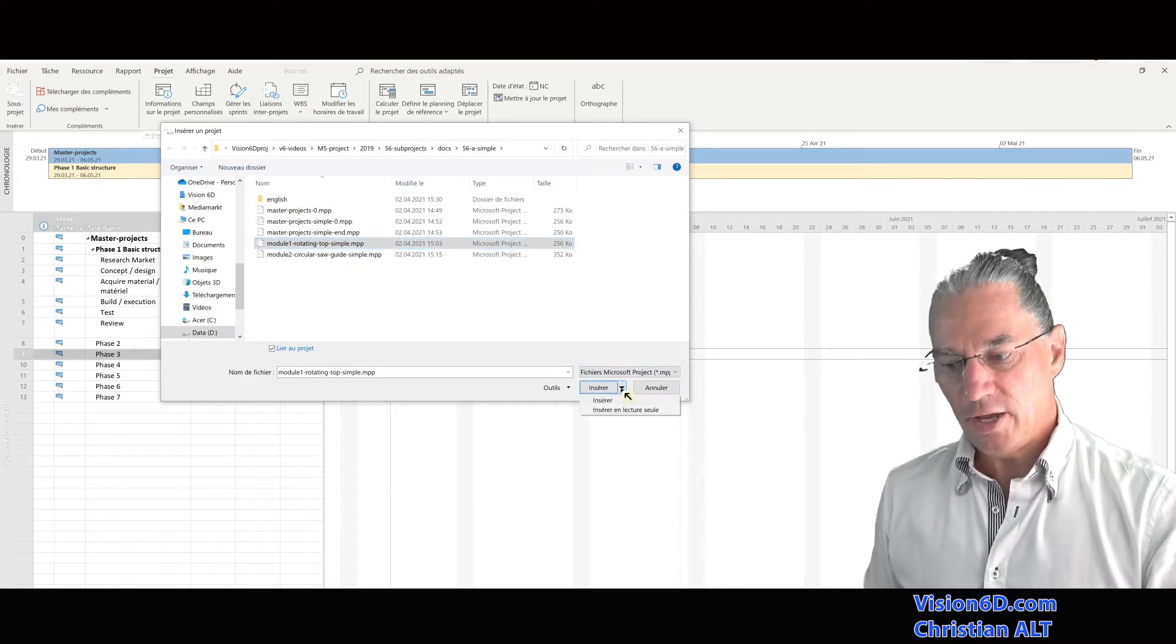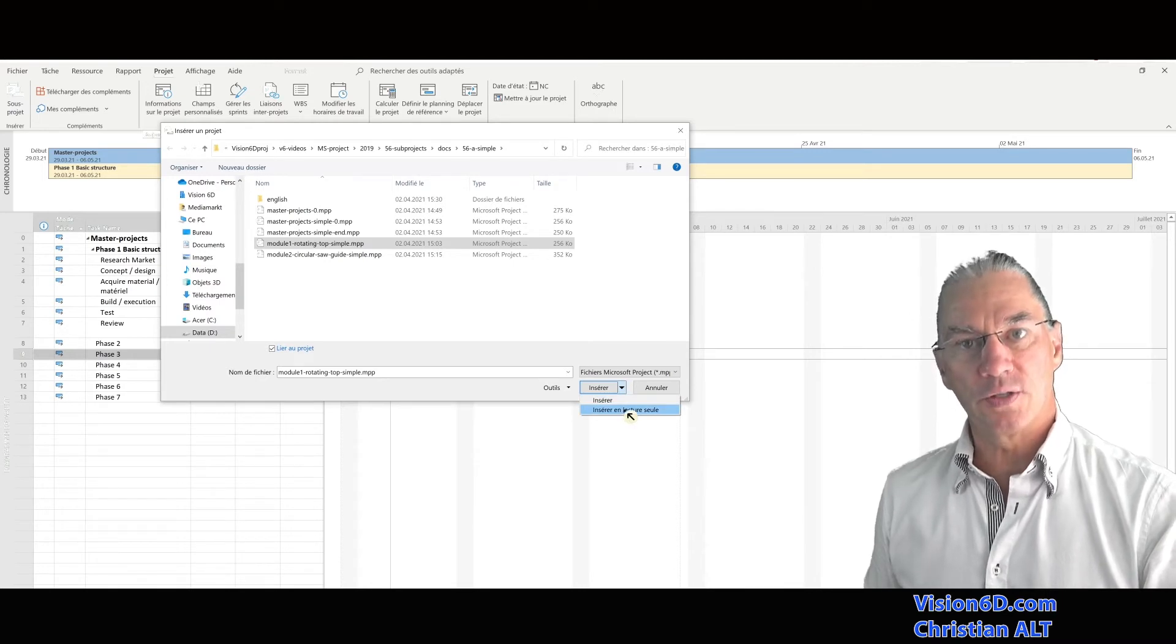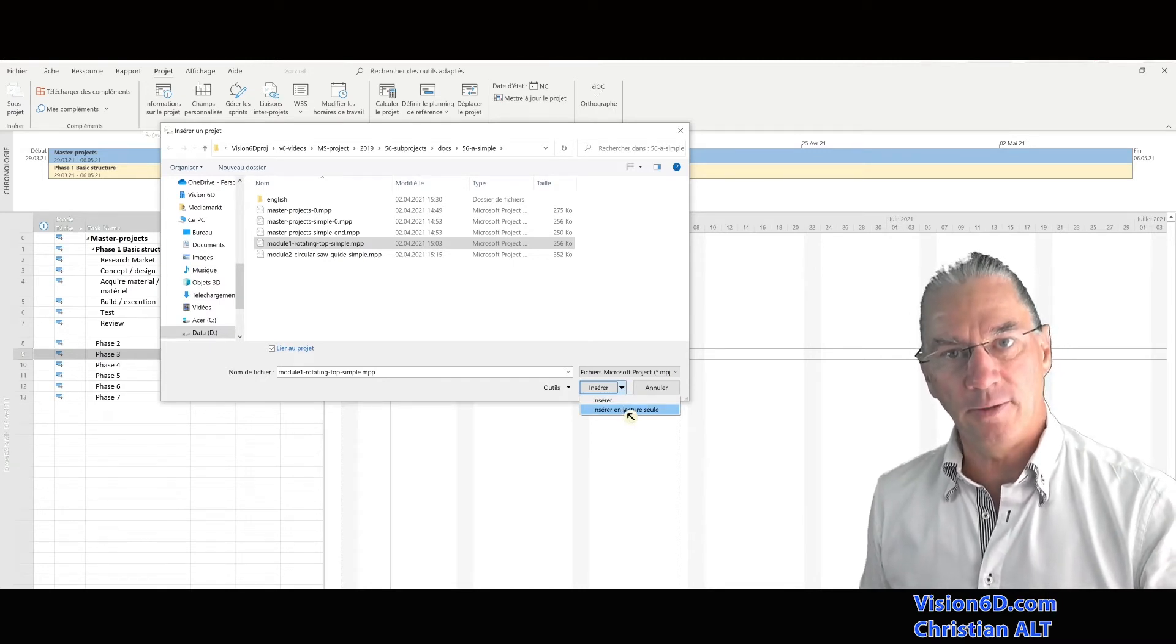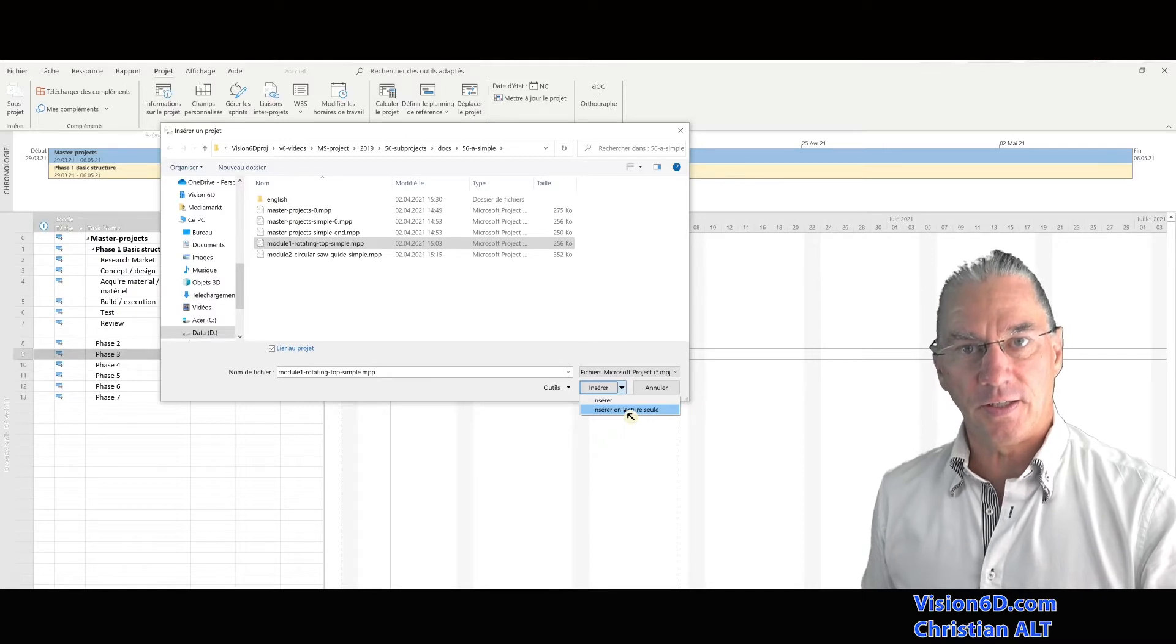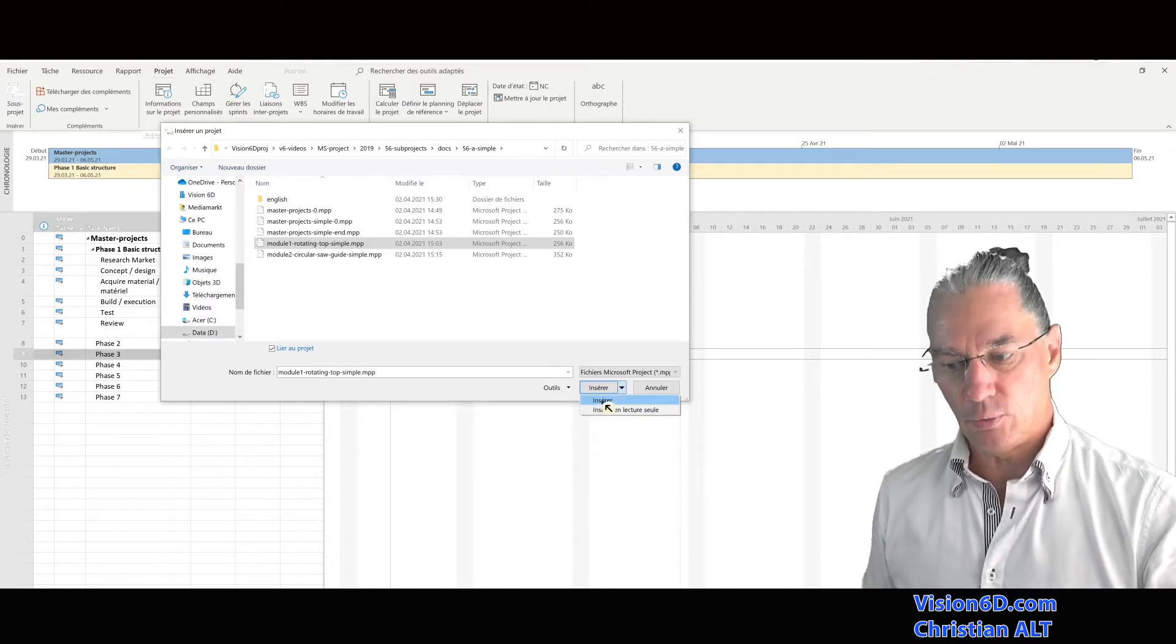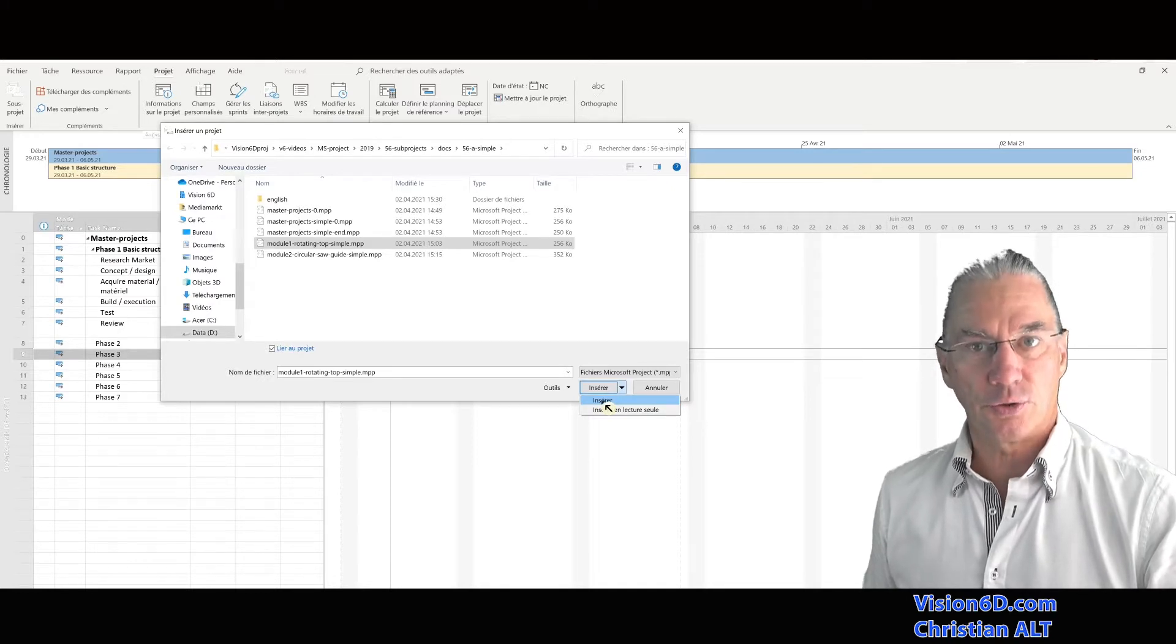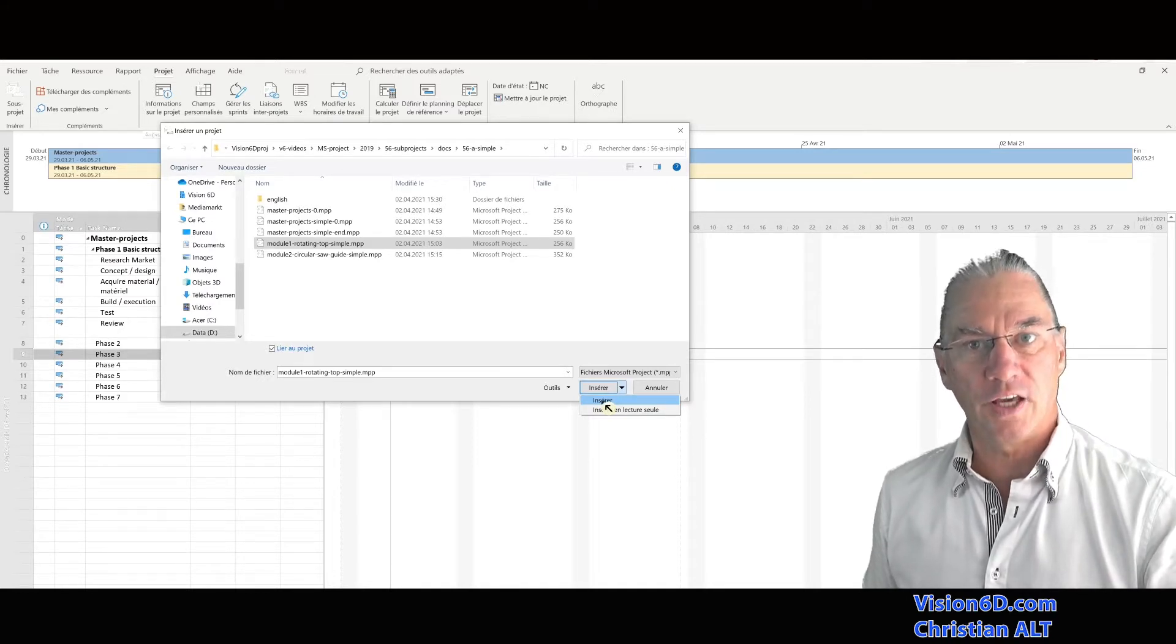We have here the possibility to say that we want to insert it read only, in the sense that in the master file, you cannot make any changes. In our case, I'll say insert it with full rights for modifications.